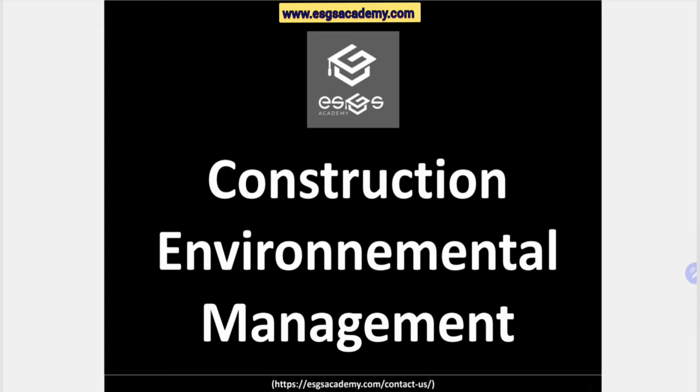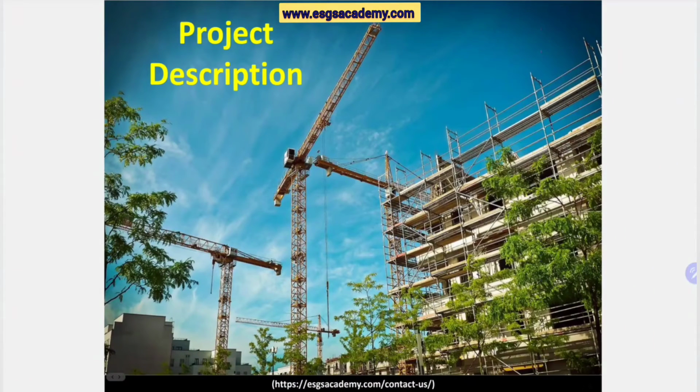For example, we can discuss the project description, where we include the location, the geographical location, the scope, the boundaries and the dimensions of the project. We can think about the overall project and planned construction activities. For that, we need to conduct environmental baseline studies of the current conditions and sensitive receptors or vulnerable areas. The construction project description is required, and the environmental permits, NOCs or licenses are required. We can also think about the project schedules and milestones in the project description.